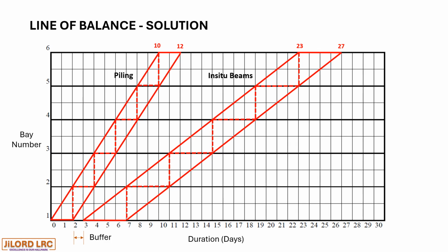So at this point, we will start the buffer from the top, leave one clear day and start the operation on day 28. So we introduce a buffer of 1 day and have the first precast deck for bay 6 fixed between day 28 and 29.